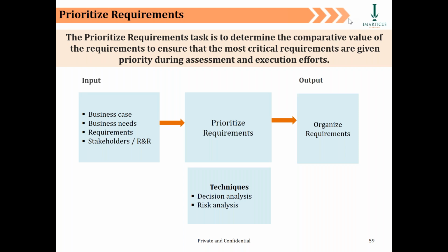Prioritization, of course, is based on some key input parameters with respect to the latest need from business, which is obviously with respect to competitiveness, pricing, market share, etc., purely business attributes, right? You don't prioritize requirements purely from IT attributes. For example, one requirement is easier to do than another, and hence you will choose that. No, that's not the case.